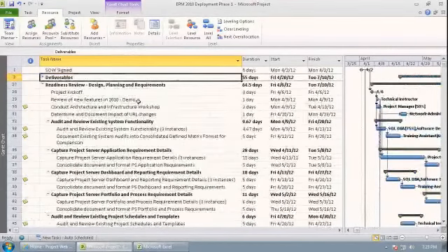One of the concepts I'm going to demonstrate here is that, in order to compare your supply and demand, we use generic resources versus real named human resources. I'm going to demonstrate that by attaching skills to these different types of resources so that we can line them up.